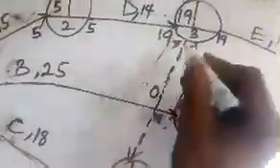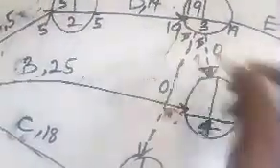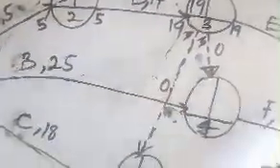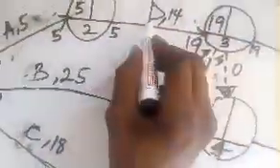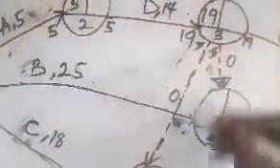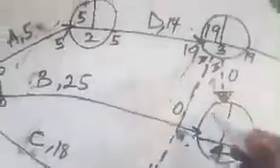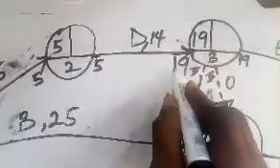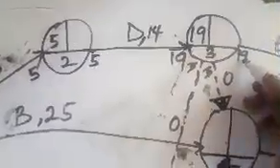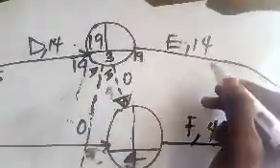So 0, that's the activity of what? Duration of 0. And why is it a dummy activity? It is a dummy activity because you cannot have two activities at the same time. You can't have the same activity processed at the same time with different durations. So it is only on this real time. This is a dummy activity. So we have this like that. Now this is 19, 19, 19. And this is my 19 here. I progress forward. 19 plus 14, I have it as what? 33.